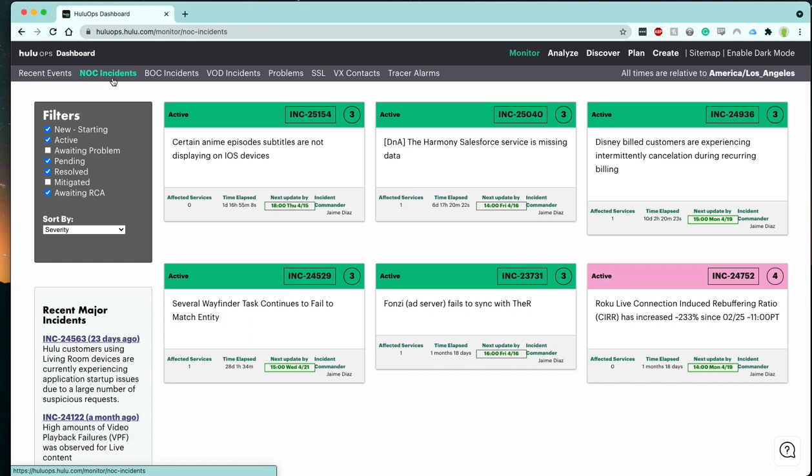So our operators are actually using this page to keep track of the things that need to be followed up on. What you're looking at right now, a bunch of Sub 3s and Sub 4s. And the way that we categorize that is Sub 3s are high priority bugs, Sub 4s are low priority bugs. Sub 3s are meant to be hit in the next sprint, where Sub 4s are meant to be hit in this sprint. And so ultimately, these are bugs that escaped to production. These are not necessarily service failures. These are things that need to be addressed and or fixed, but they are not necessarily cause for an all hands on deck situation.